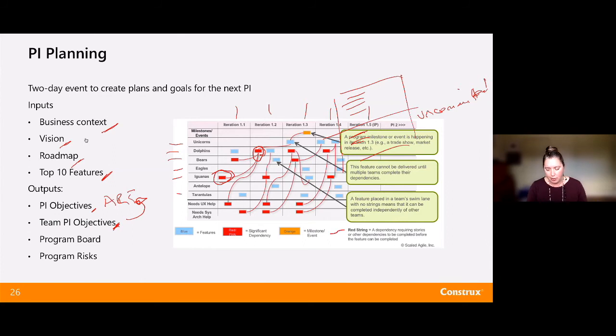A lot of the organizations that I've worked with that are geographically distributed will find it's a little bit more than a 2-day event. Let's say we've got the group in Seattle and the group in Bangalore. There's going to be some combined time where we're all talking together. There'll also be some planning time where Bangalore plans while we're asleep, we plan while they're asleep, we get back together, we talk about that more. So often that's more like a 2.5-day session just because of the time zone overlap.